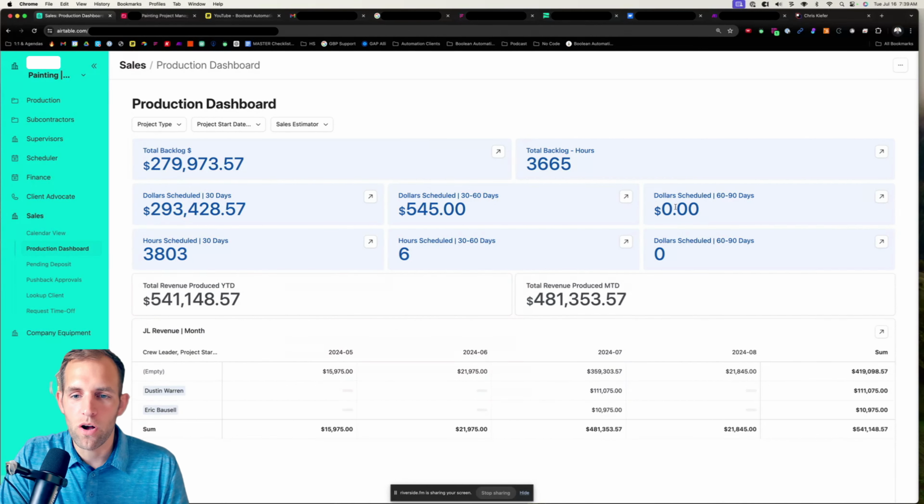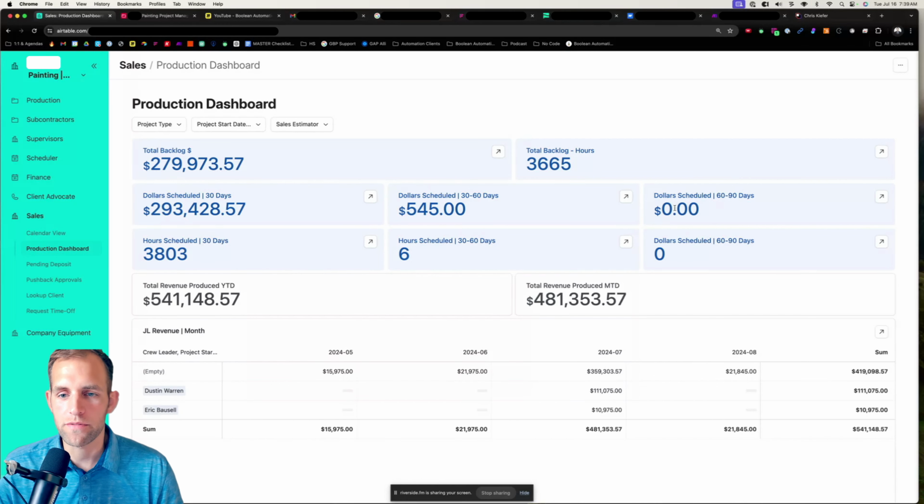And the thing is, with all of these reports, you have to pick, are you going to use the start date or the end date of the project to choose where you're putting that revenue? Because all reports have to be based on a date field. And since the project start is in July and the project end is in September, I have no way to put any revenue into August, or better yet, I don't even know how to put revenue into the correct month that it's supposed to go into.